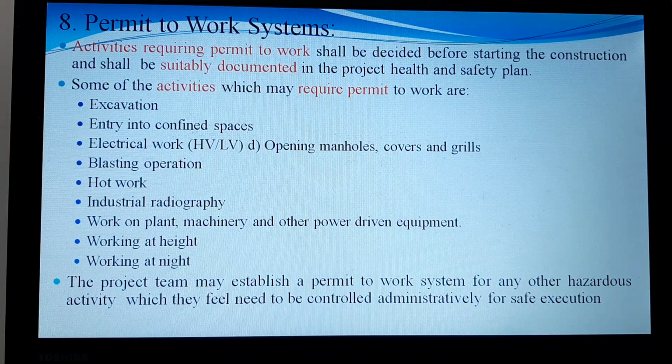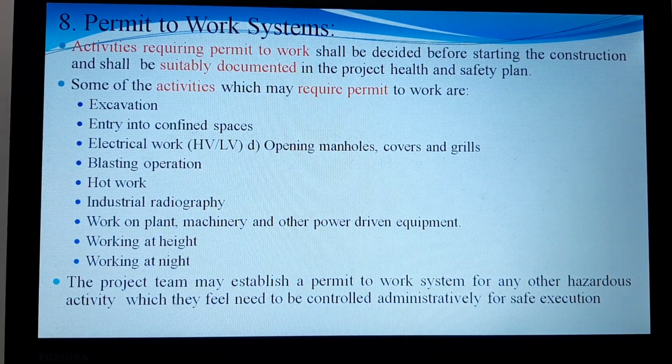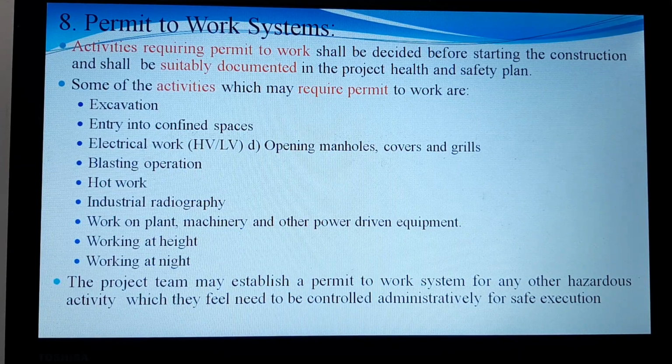Once those activities are in progress, a proper work permit has to be provided, especially for works like excavation, entry into confined places, work with high voltage and low voltage, openings, manholes, covers, grills, etc., blasting operation, hot work, industrial radiography, work on plant, machinery and other power driven equipment, working at height, and working at night.